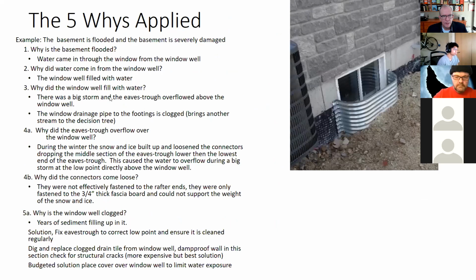So I kind of go through this process. Usually the reason it's called the 5 whys is when you ask why did this happen once? And again, that would put somebody off just by the tone. You have to understand that the first level, the first question, doesn't get you deep enough. You've got to keep going. It might only take 3 whys, but it might also take 8 whys or 10 whys. Usually it's around 5 whys deep that you get at the root cause.